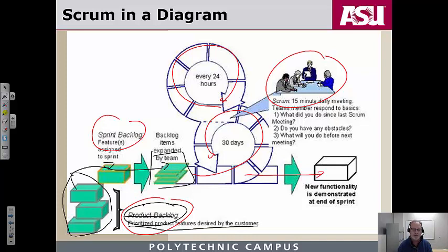We'll talk about that. And in that sprint planning session, the fundamental thing is to take the highest priority items that can fit in the context of a sprint. And a sprint is, again, a time box. Here it says 30 days. You're going to do 2 weeks. 2 weeks is somewhat of an industry norm now. Shorter sprints are considered better. But whatever the short iteration is defined to be, and whatever your team's velocity or capacity for doing work is, you grab the appropriate amount of stuff off the product backlog, move it to the sprint backlog, and start to churn through it. Okay?